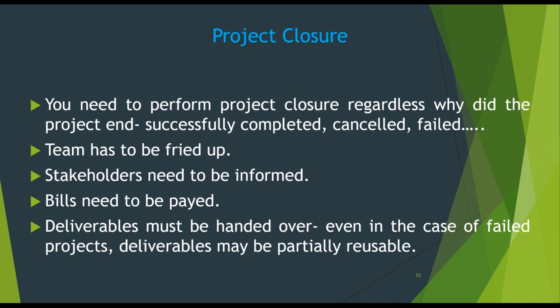Generally, you need to perform the project closure regardless of why the project ended — whether it was successfully completed, cancelled, or failed. The team should be cheered up and whatever the outcome, it should be informed to the stakeholders. The bills are to be settled and deliverables must be handed over. Even in the case of failed projects, deliverables must be partially reusable for future projects.